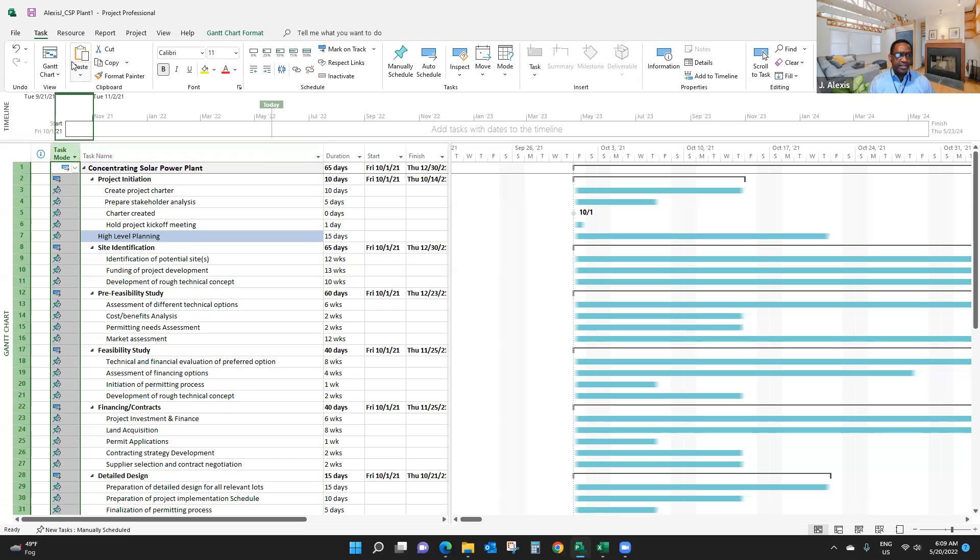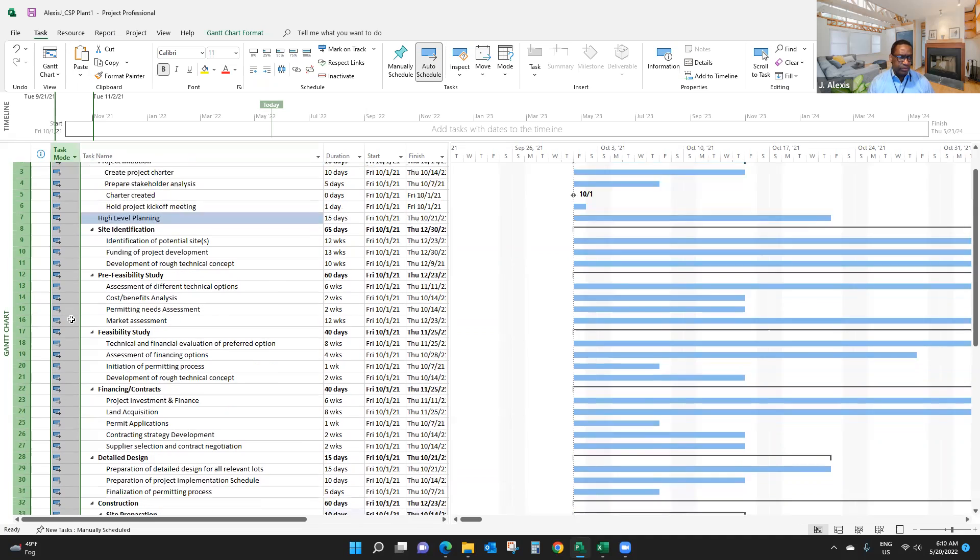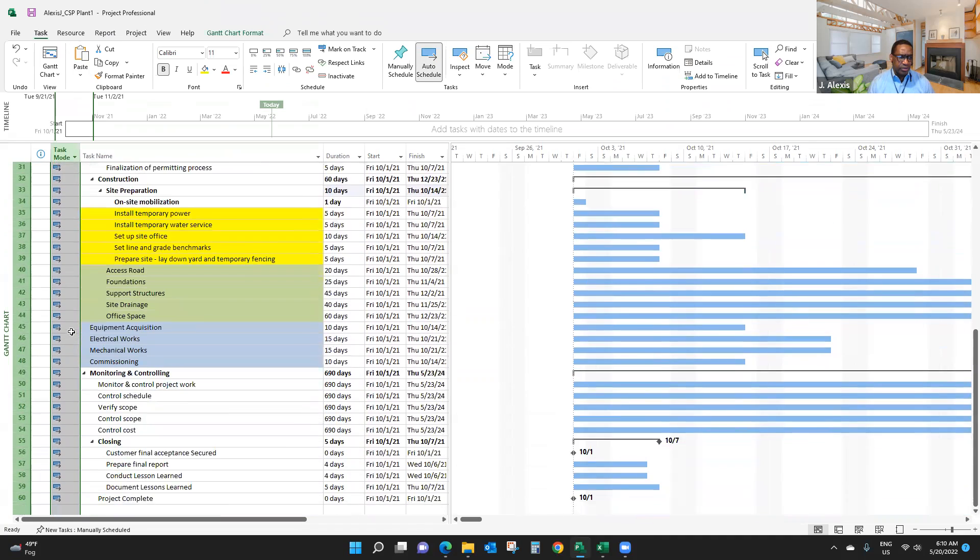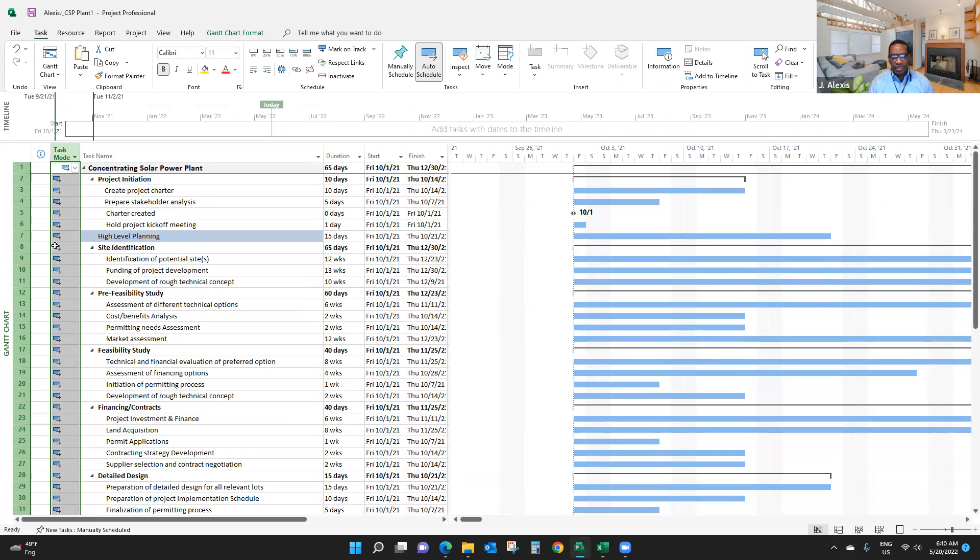To do that, click on the Task tab here, and you click on auto schedule. So everything here now is on auto schedule. The key difference is manually scheduled items will have a pin, and auto scheduled items will have a Gantt bar, which is now here.